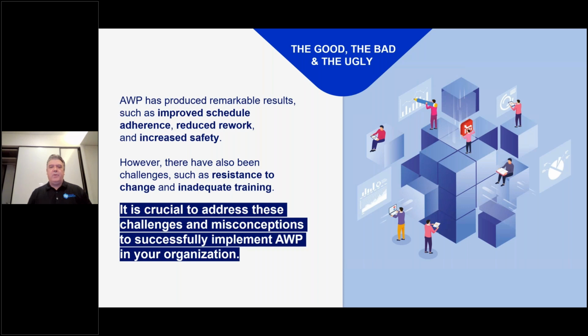Scheduling of IWPs, a look-ahead schedule, okay, maybe I'm building a 3 to 8 week, really extending that schedule out, but scheduling IWPs is a standard practice. And again, coming back, this isn't I build a perfect plan up front, and that's exactly what I'm going to execute.